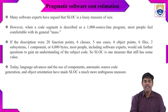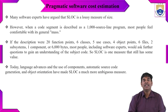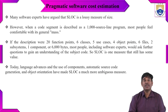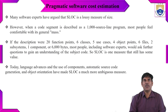SLOC is one measure that still has some value. Other criteria to calculate software cost estimation include function points, number of classes, number of use cases, object points, files, subsystems, and components. Today, language advances, use of components, automatic source code generation, and object orientation have made SLOC a much more ambiguous measure.